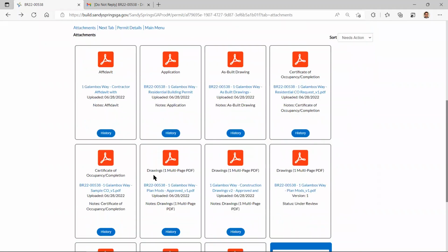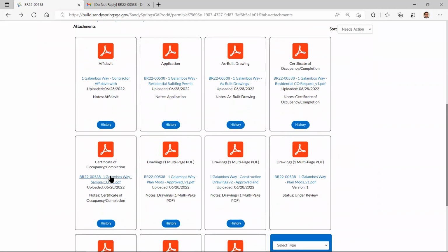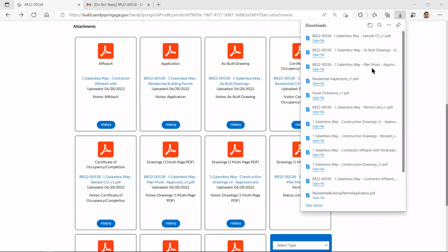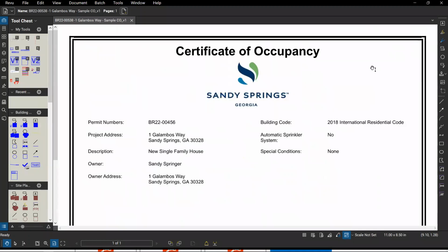To add to John's point about the COs from a site perspective, your site has to be prepared, it has to be ready. If the instance is I cannot get sod, we have some instances where we said, okay, you put up a cash bond for the same value of the sod you're going to install, but you have to at least stabilize your site with seed and straw, and it has to germinate. You have to go through some steps. It's not just leave the site work until whenever the building's ready to go. It has to be as near perfect, as near complete as possible. Yep. And like I said, every site's different, but we will try to work with you.